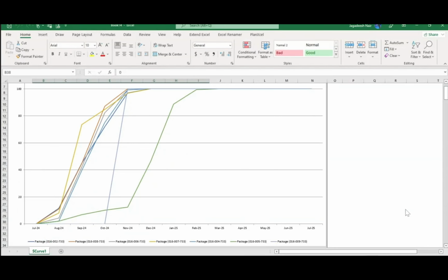For example, you have a schedule and then you have precedence activities which govern it. For example, you have some package issuance, and only after the issuance of the package or an engineering deliverable, we have the material delivery. Then we have the execution. So unless you have proper S curves between these, with a proper gap, one will not be sufficing the other. This way you can see that you are creating a plan, but your precedence plan is not meeting your requirement or will not help you meet your required dates. So these types of flaws we can easily identify using this method.